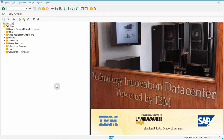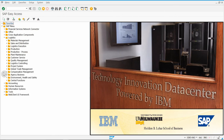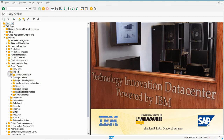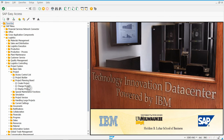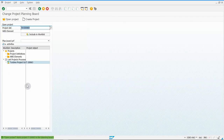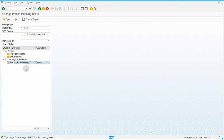Let's hop right into it. Exercise 73 is to assign a resource to an activity. To do that, go to Logistics, Project System, Project, Project Planning Board, and Change Project. The first thing we have to do is assign a work center to an activity so that we can choose which employees will work on that activity.